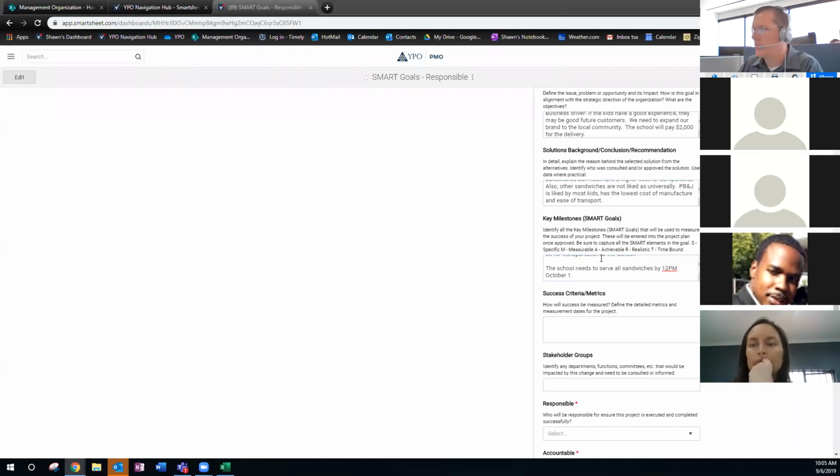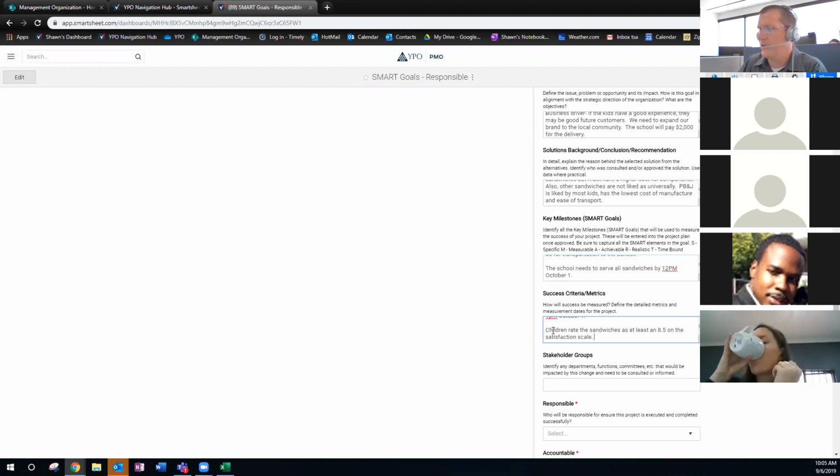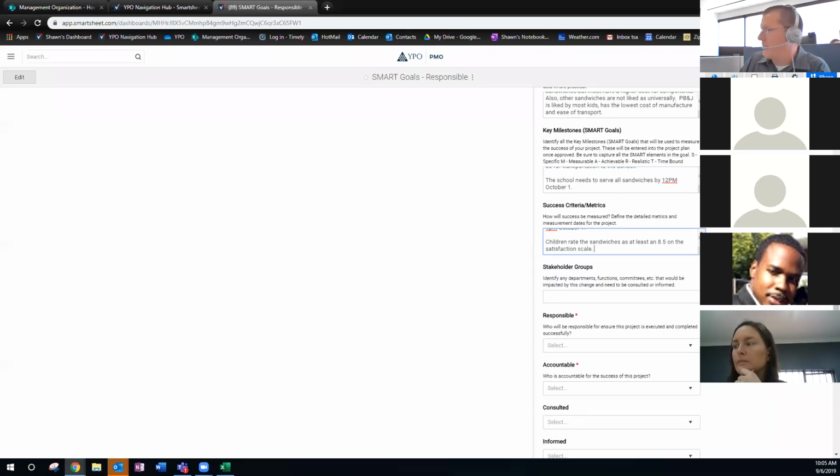Now, the one above was some key milestones that you could measure yourself, but this is also how we're going to do it. So we're going to say all children at the school are fed by 1 p.m. October 1st. That's one success criteria. If they didn't get fed, then you're not successful. The other thing is the children rate the sandwiches as at least an 8.5 on our satisfaction scale. So we're going to do a survey and find out whether they liked our sandwiches or not.